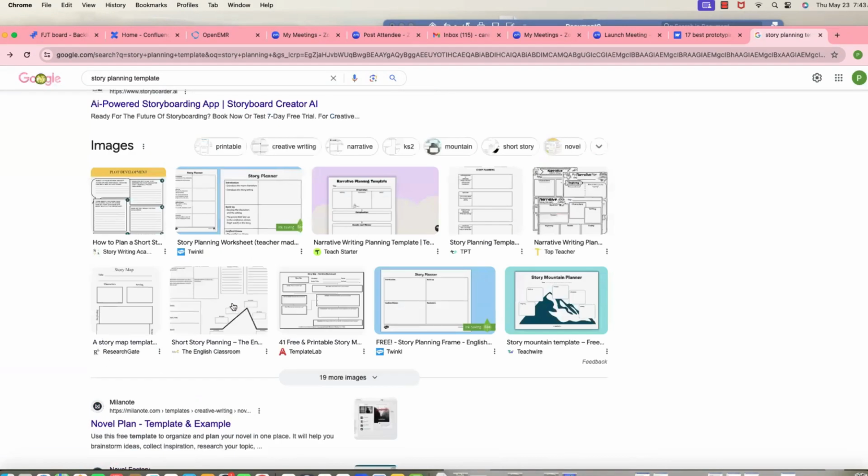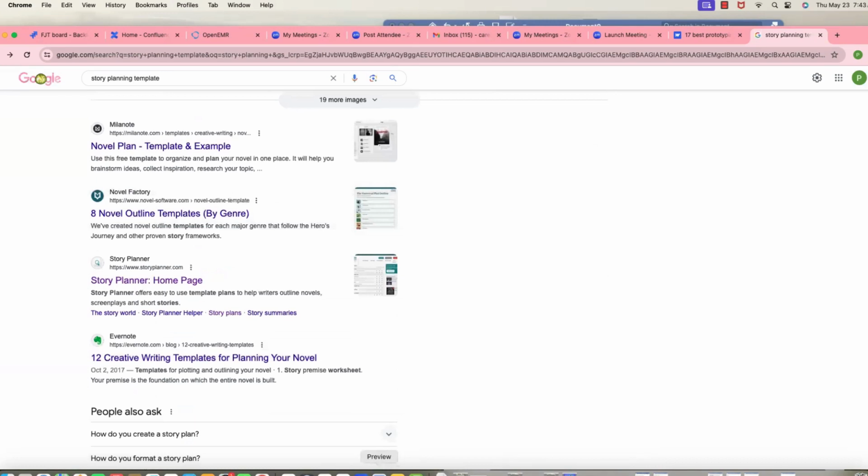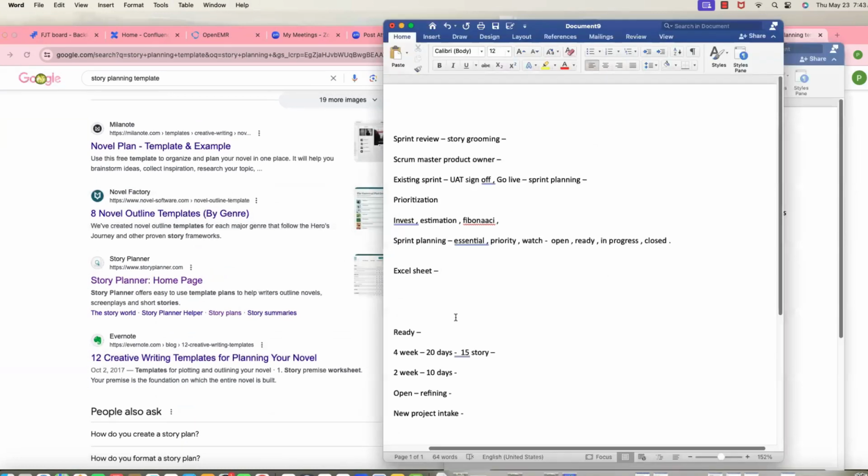Usually, what we do is, everyone will not have 15 points. Right now I'm saying that you will have 15 points, but in reality everyone will not have 15 points. It's the seniors who are having these 15 points. If you are junior, your points will be reduced. Initially, if you're only starting this month, they will give maybe 10 pointers, or sometimes they don't even give any if you are joining as an intern. The very first month it will be observation only, so it's not like everybody is getting 15 points.